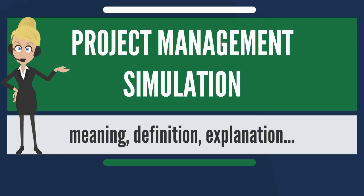Project management simulation is also used to analyze real projects. The goal of the simulation is to show the user the different possible outcomes of their decisions, along with the probability that each outcome will occur. The simulation helps in reducing project risk and in choosing the best project plan. In a typical simulation, the project is first modeled into a software tool along with uncertain variables. A simulation is then run to check the different possible outcomes and their probability as a result of different inputs for the uncertain variables.